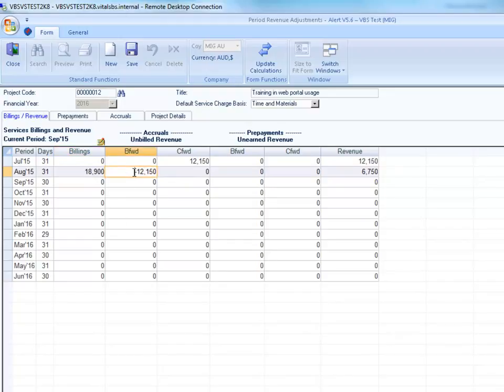The Earned Revenue method setting on the Financial tab in the Project Maintenance form, being Hours Earned, is therefore useful for projects such as these that are charged on a time and material basis, where it's not expected that invoices will be raised until after the financial period in which the timesheets were entered.